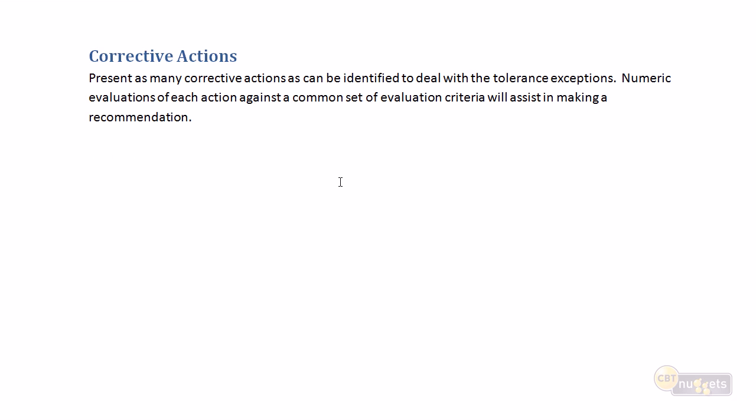Present as many corrective actions as we can. There's often more than one way, and often we're going to get the most effective solution if we present multiple ways to deal with a specific exception. And I suggest some form of numerical evaluation of each action against a common evaluation criteria. So we're going to come up with a common evaluation criteria.